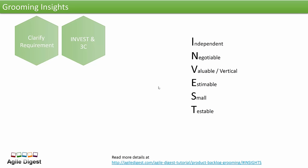The story state workflow: stories start from Backlog, then after grooming they move to Groomed or Defined. Next, when we plan the sprint and start development, the story moves to In Progress. Then it goes to Completed, UAT Done, or Verified — whatever states you have — and finally to Done. After making the story groomed, we set its state to Groomed or Defined.